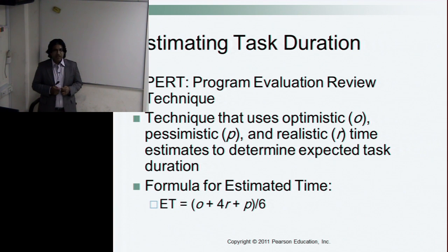Being optimistic, if in reality it takes, let's say, 30 minutes to arrive home from the university, I can say yes, I can arrive in 20 minutes or 25 minutes. Okay, I can arrive early. But being pessimistic, I may think no, 30 minutes is not enough, so I may need more, 35 minutes or 40 minutes. So now, if pessimistic and optimistic approaches or times are clear, then we can use a simple formula to calculate expected duration.